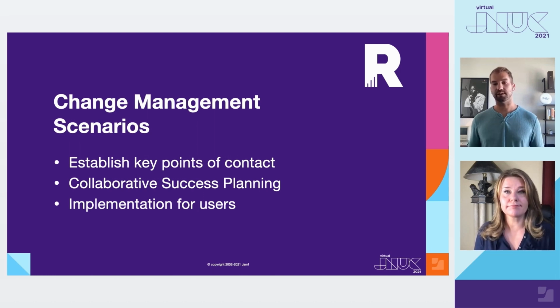So this was a really important thing for this project that I was working on with Acme, because the people I was talking to, like Shanda said, weren't the decision makers. And we were running into an issue where the users were being blocked from doing their essential job by this McAfee web proxy. And cybersecurity was saying, we need to have this in place. And the users were saying, we can't do our job with this in place. And I had no one to talk to that could actually make a decision either way. So Shanda was able to put me in touch with the right people who could actually say, well, maybe we can make some small changes to this so that they can do their work and be secure.